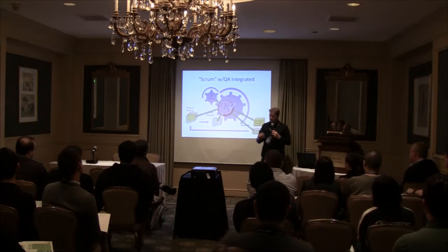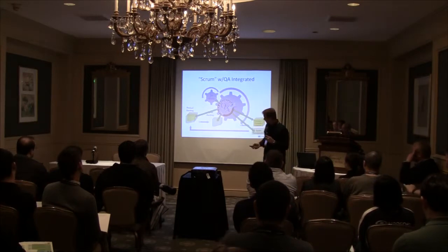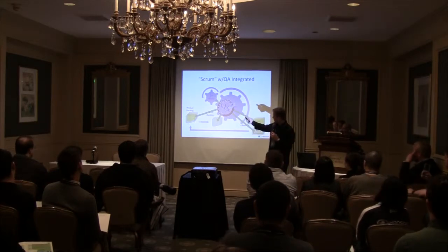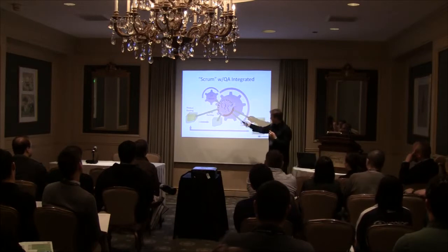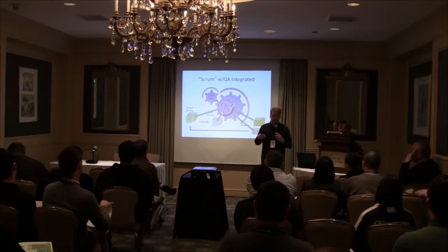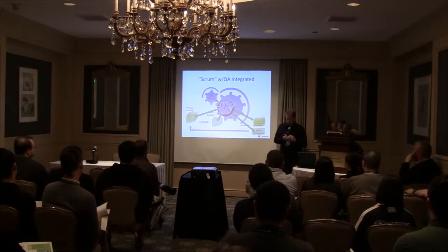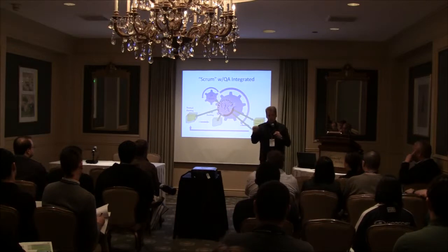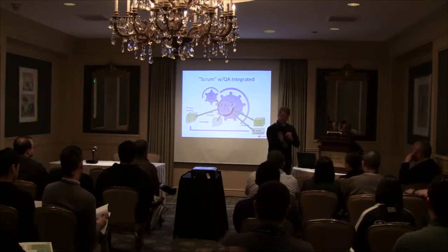Moving into the sprint, of course, we talked about this concept of being involved in the daily process with the daily stand-up throughout this entire sprint process. And then obviously at the end of this time, we're going to go through a process of passing these acceptance tests for completion, whatever you're going to call them. When I'm with clients, I advise everybody to set up a process so that as a feature is delivered, you test each one of those features as early as you can to certify them off and lock them off.